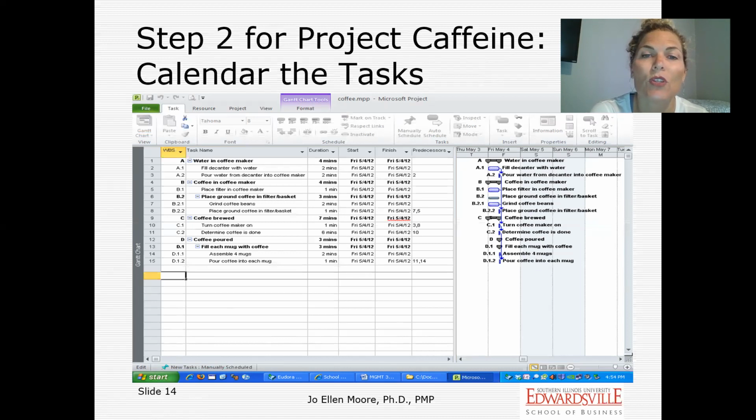So when you start calendaring your events, don't think about necessarily how long it's actually going to take you to have the meeting, right? Say in your project, you plan to have a meeting on day 4. So you have a group meeting as one of your sub-deliverables, or maybe a task underneath the sub-deliverable. That meeting in itself might take 30 minutes, right? But let's give ourselves a day to get that accomplished.